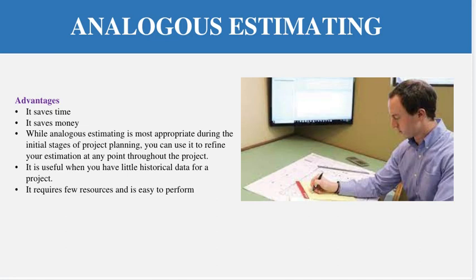The advantages of analogous estimation are: first, it saves time because you are not doing drill-down level estimation, and it also saves money. Second, it is more appropriate during the initial stages of project planning and you can use it to refine your estimation at any point throughout the project. It is useful when you have little historical data available for a previous project. It also requires few resources and is easy to perform.